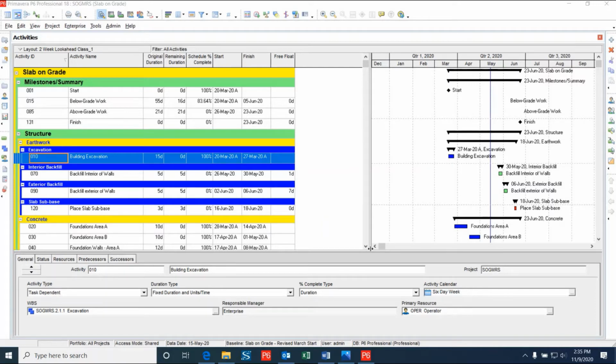Hello, in this video I'm going to discuss with you how to create and assign baselines within Primavera P6. Baselines are used in order to evaluate progress against a previously set schedule and should be implemented for any type of project. Baselines are necessary to compare the original plan to the actual execution, where any factor that could impact the schedule is taken into account.